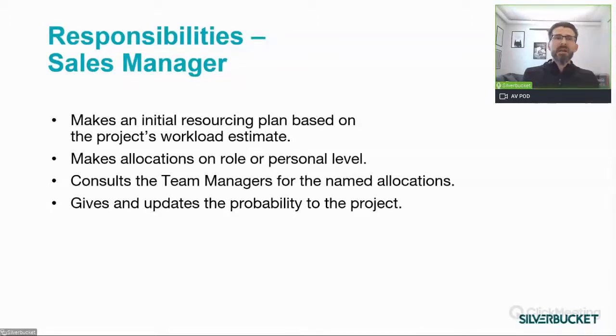In this phase, the allocations are estimated in pretty high level, and the sales manager should be able to define roles needed by this opportunity. Of course, in some cases, it might be required to nominate specific people to the project team. In this case, the team managers should also be consulted. But what is also important here, the sales managers should also estimate the probability of the opportunities.